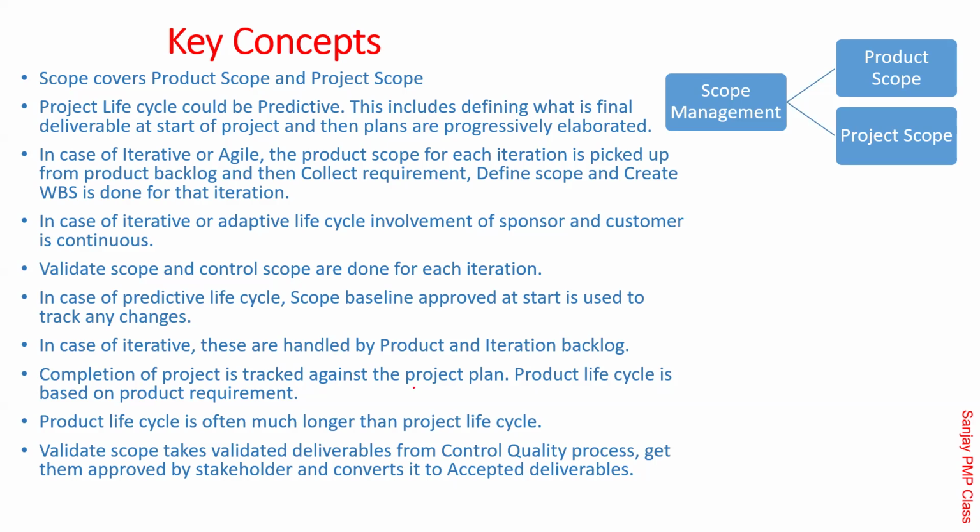Project deliverables are tagged against the project plan. Product is a product requirement. Your food is made and has come to the hall, Shishir, product requirement fulfilled. But that doesn't complete the project plan. Project plan means cleaning the gas stove, keeping everything in its place. So there are so many other tasks. Very funny example, but are you getting my point? Project is tracked against the project plan, product is tracked against the product requirement. There is a difference between these two, correct?